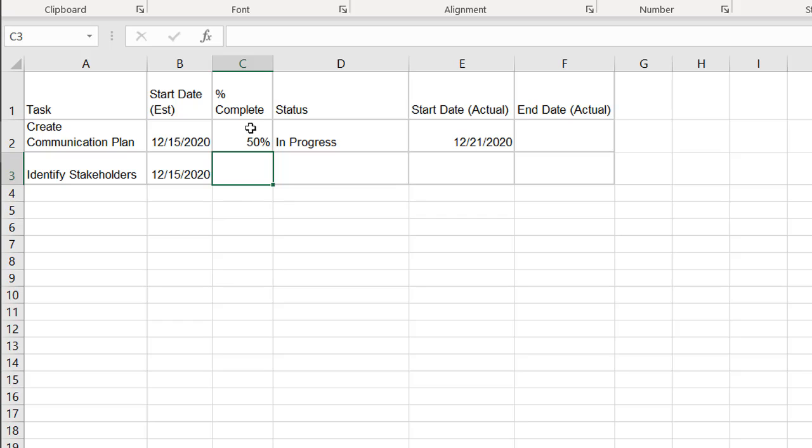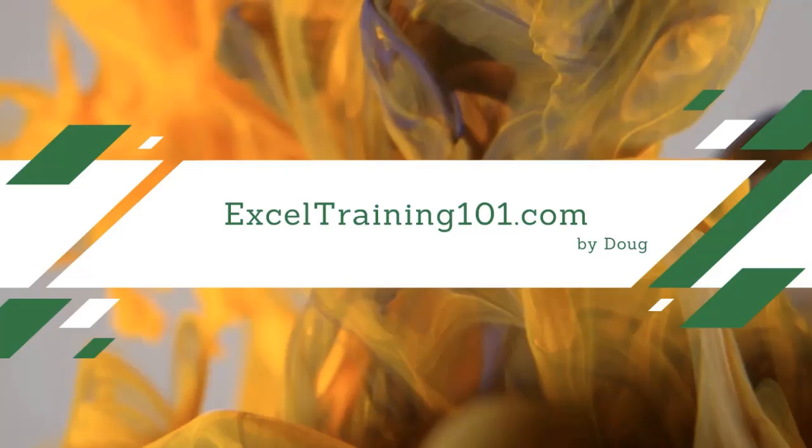Now let's say my end date, let's say that I actually got to 100% complete. That end date should fill out, and I fill out end date of 12/21. Now, if it really wasn't complete, we had 99% complete. That shouldn't change, but that should disappear, right? So that shouldn't be there at all. So let's see how we can create something like this.